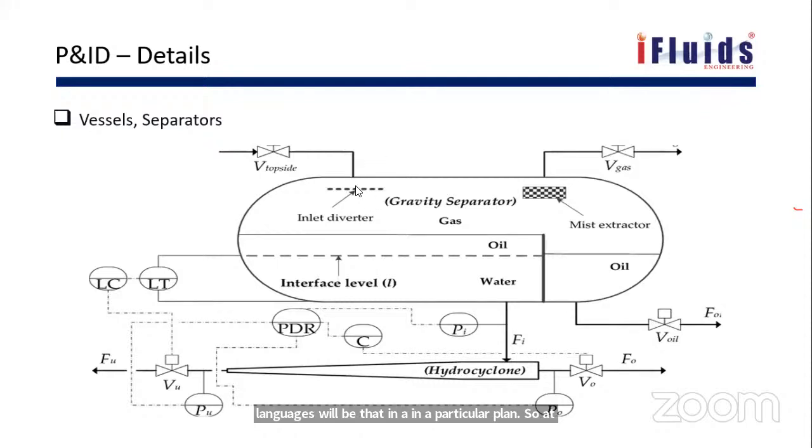It will take time again. So you cannot connect, and if you cannot connect, we cannot complete this construction. Then this will lead to a subsequent delay in the project. So ultimately, a huge loss. So to avoid that, wherever there is a flange rating, then the different spec break is there, that we need to mention.